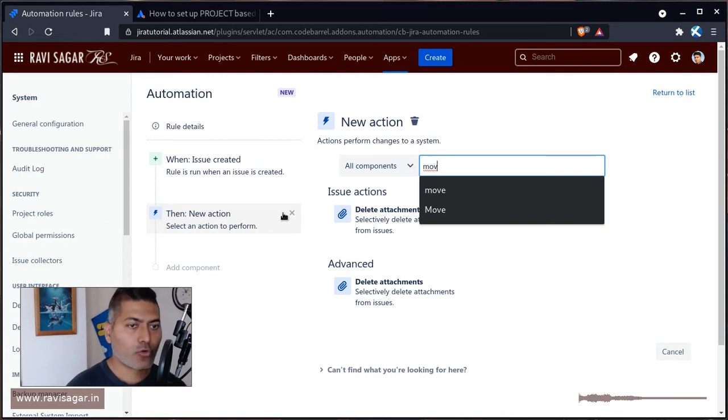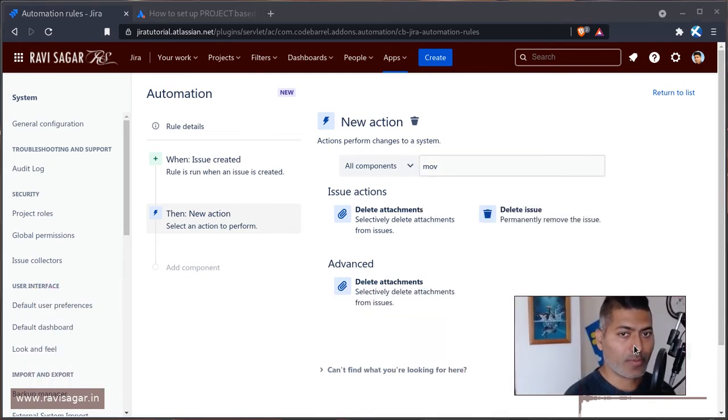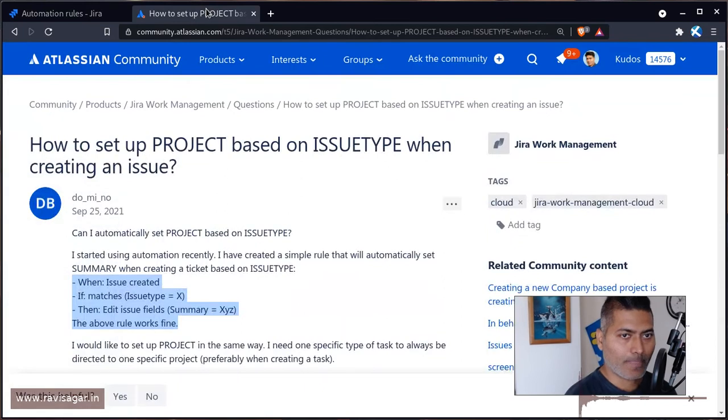So when you have your own issue and you need help from someone else, then either assign the ticket to those users, if those users can be assigned issues in your project, or just create an issue for them in their project and link it to your issue, not project. So I thought I'll probably make a video on this topic because when people start using Jira, they are not exactly sure how these things work.